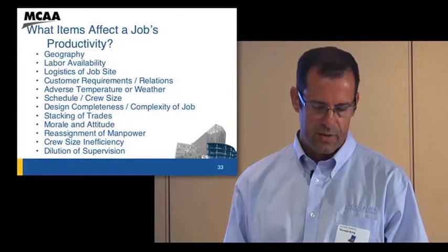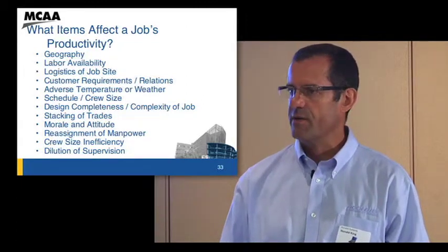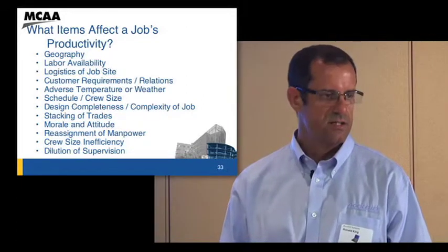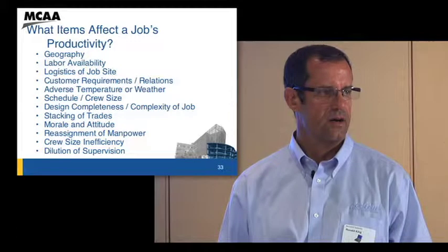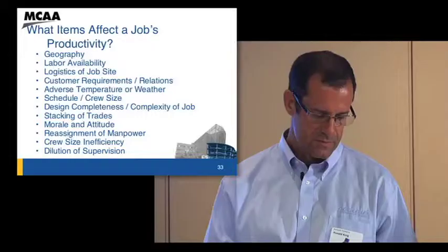The labor availability for that particular job site will affect it. Logistics to the job site: where's your laydown area? I was in Las Vegas not too long ago, and when they were building the Aladdin, I saw where the laydown area was, and it was about half a mile away from the actual job site itself, just trailer after trailer after trailer. So imagine trying to get your material over and get it staged, ready to go up. So that laydown area, the logistics to the job site, is really important.